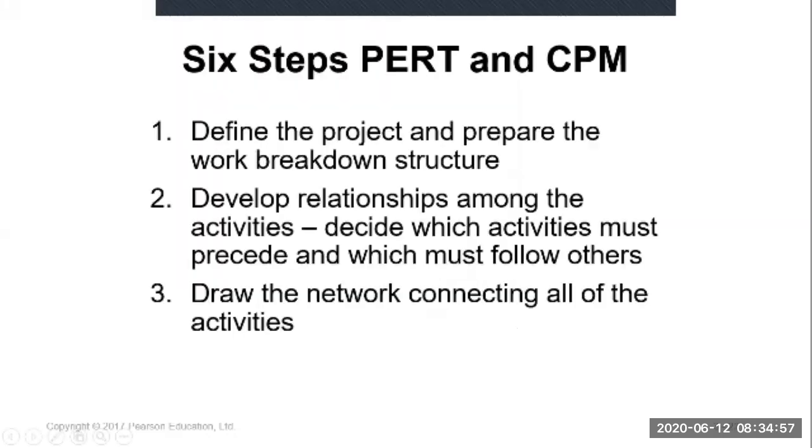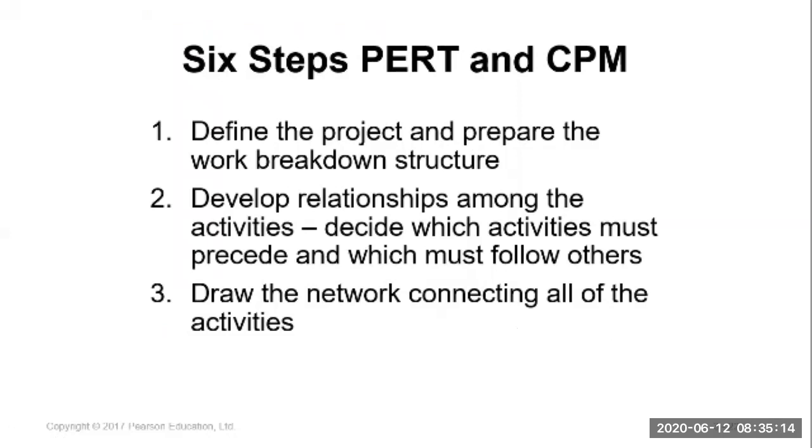Okay, so this is the steps in PERT and CPM, same steps. First, you have to identify the work breakdown structure and each activity. Then identify the relationship among the activities, which one comes first, and then which are followed by the others.